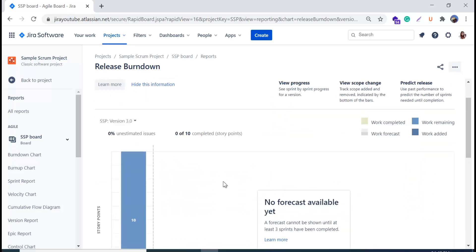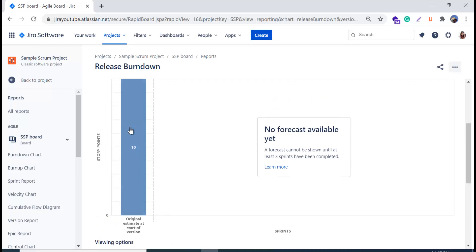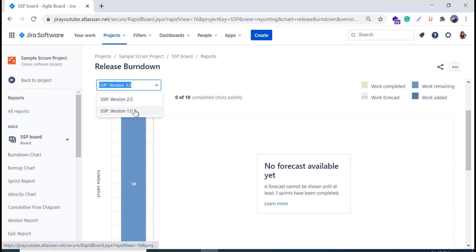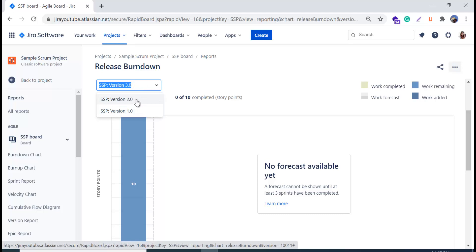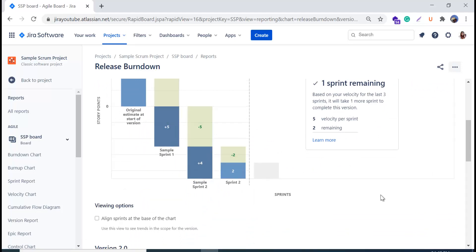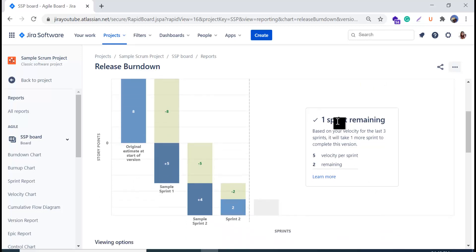In the report, the Y-axis shows story points and the X-axis shows sprints. The first bar represents the original estimate at the start of the version. For version 3.0 we don't have many sprints, so we can change the version using the dropdown. We'll select version 2.0. Now we have three sprints — with three sprints, it can show you the predicted number of sprints based on past performance. You can see one sprint remaining is predicted based on your velocity over the last three sprints.